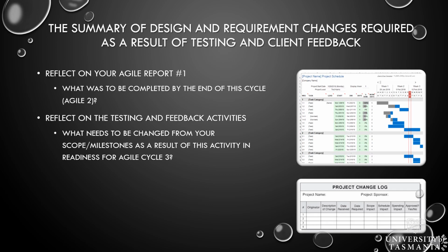every time we want something to change, we actually need to document that, justify it, and get permission for that change. So now you're going to be actively bringing your client into this change process, and they are going to say whether that change is approved or not, because this project belongs to them. They get to say what is appropriate and what is not. So as a result of all of your previous work and your reviews, if there are changes to be made, they now need to be documented in this way.